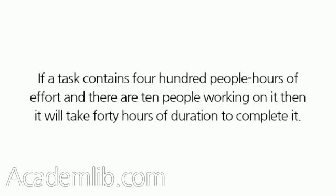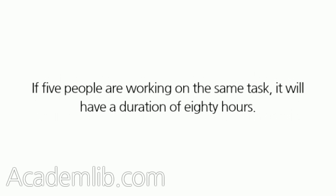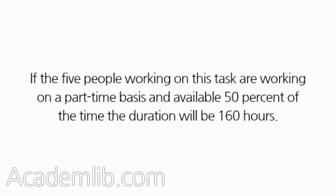If a task contains 400 people hours of effort and there are 10 people working on it, then it will take 40 hours of duration to complete it. If 5 people are working on the same task, it will have a duration of 80 hours. If the 5 people working on this task are working on a part-time basis and available 50% of the time, the duration will be 160 hours.